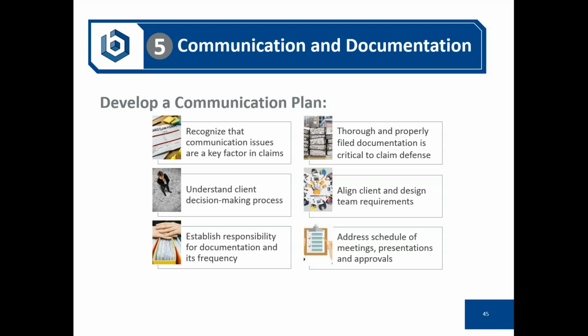Our advice is the larger and more complex the project is, the more definitive you get about what you're including and what you're not including in terms of your basic services, in terms of meetings and presentations, and document what that approval process is for the client so that you understand it and you can budget your time and share that strategy with your client.